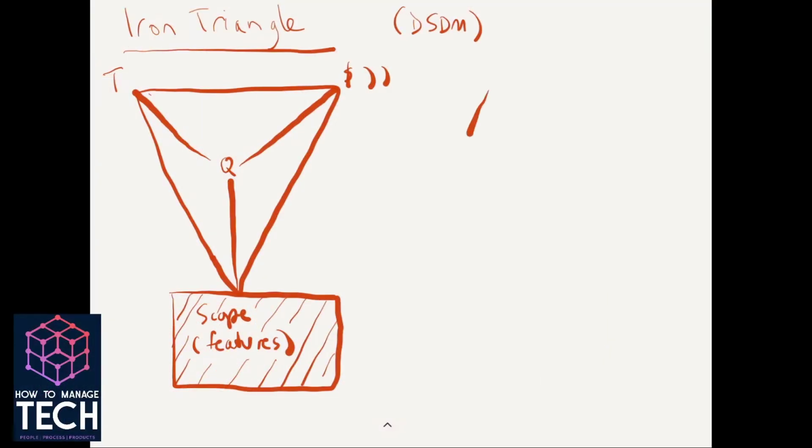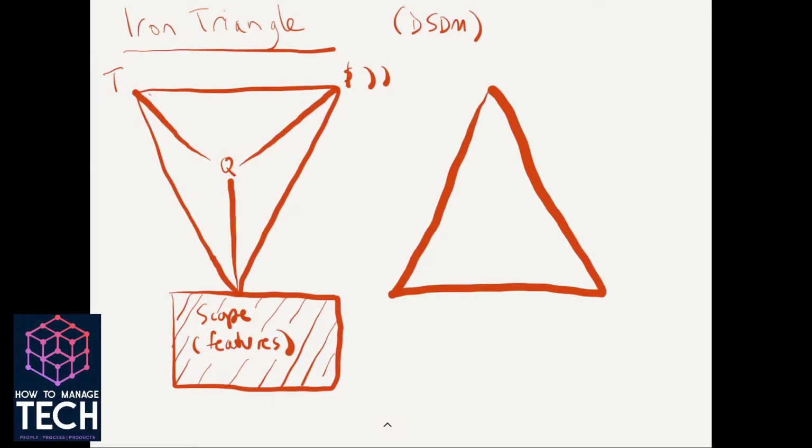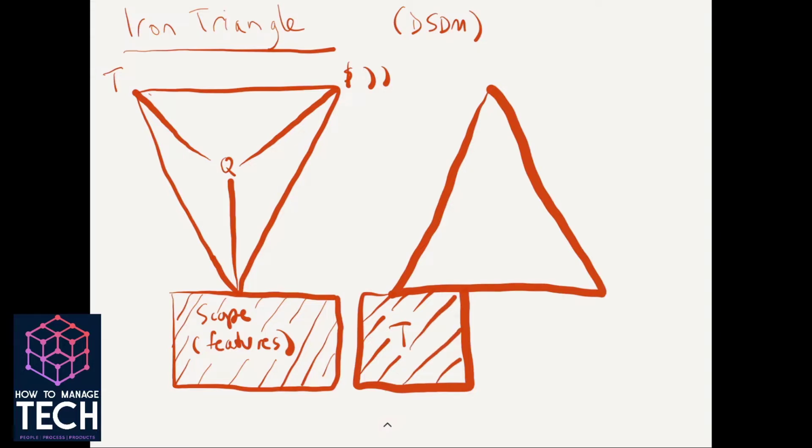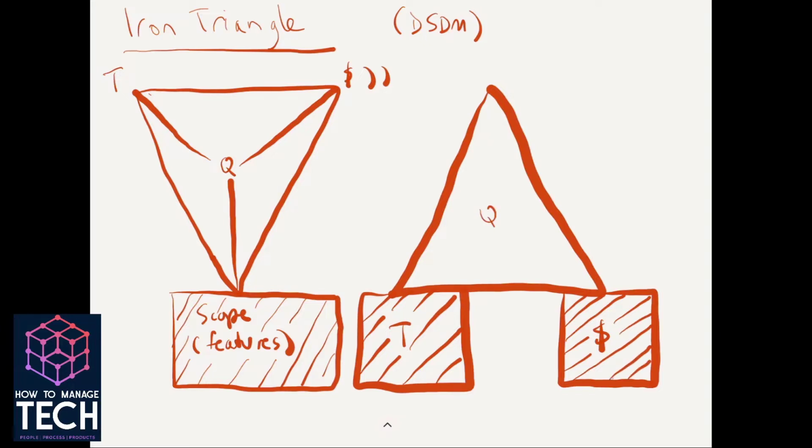In order to guarantee on-time, on-budget delivery, we're going to lock off the schedule, lock off our time frame, and say it will be delivered on the day that we estimated. There is a trick here: we do use ranges in the early days, a range of estimates, but that's all right. We will say that to the budget, to the resources we're allocated, we won't go over that, not a single cent, and we will deliver to the agreed quality. That's also locked off. Probably should draw a little locking off here like so. Instead, what we're going to do is flex on scope. How is this possible?